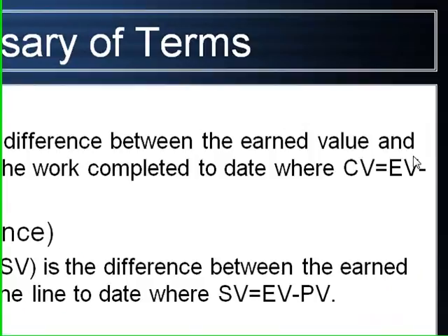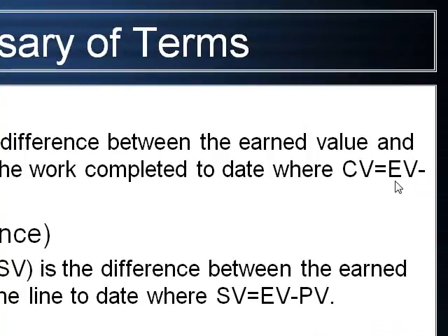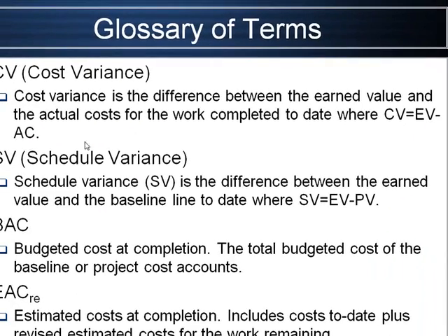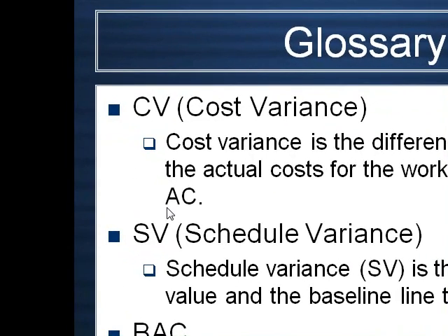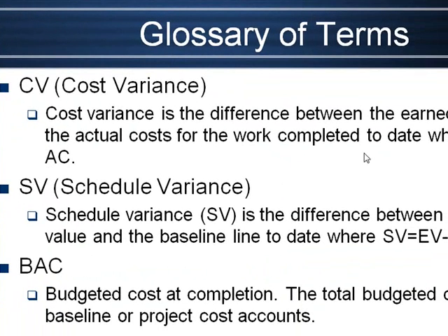So to complete 20% of the work, we thought we would spend 40, but when we checked the receipts, we saved 5,000 dirhams. That 5,000 dirhams is the cost variance, and it's a positive thing, probably. We take what we thought we would spend and subtract what we did spend. If that number is greater than 0, it indicates a cost savings. But there might be a reason for that, so we can't simply say it's a good thing.